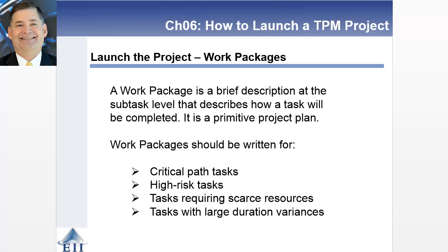Work packages are going to support this allocation of resources, because what it's doing is taking those activities and tasks and breaking them down into a mini, if you will, project plan. So you want to do this for those things that have a significant impact on the overarching project. So your critical path tasks, your high-risk tasks. If you've got a person that has a particular talent set that is scarce or not common, you may want to have those work packages around just that person.